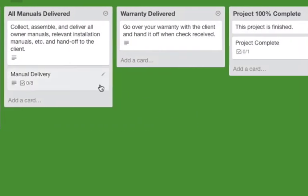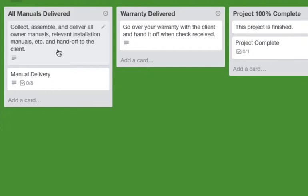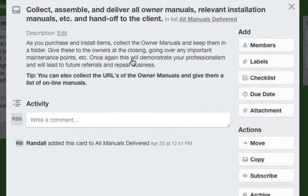And then when you go to closing, all along you have collected and assembled all of the owner manuals, relevant installation manuals, etc. And you are going to hand these off to the client. And you have kept them in a folder hopefully. You make a nice folder for them and hand those over to them.